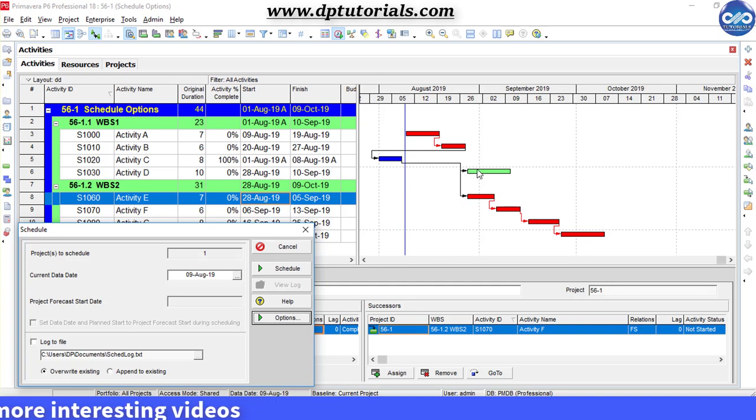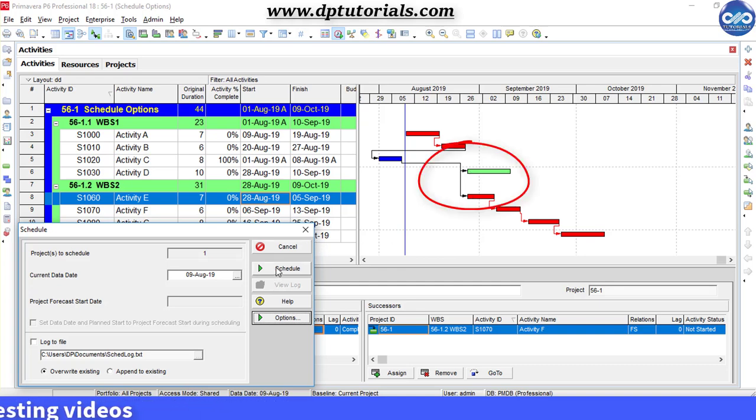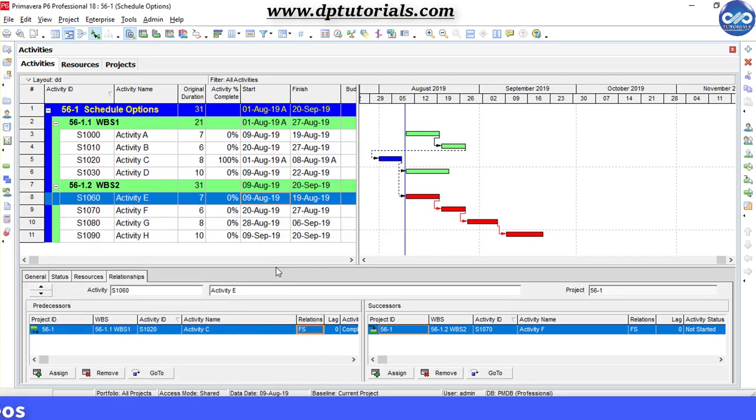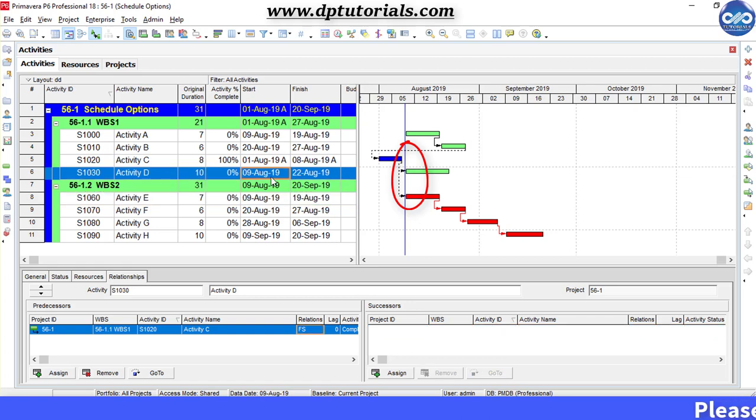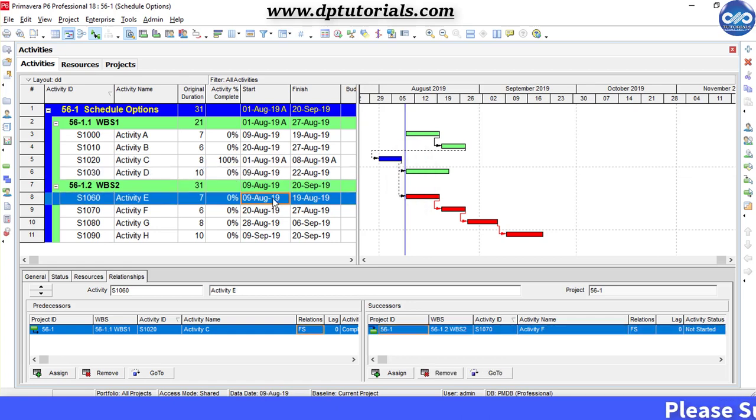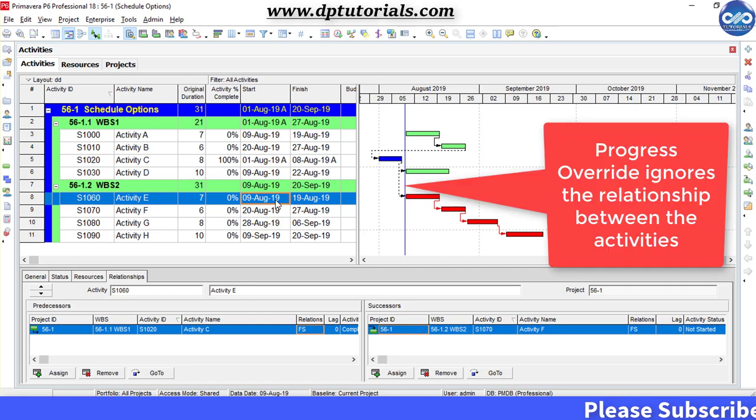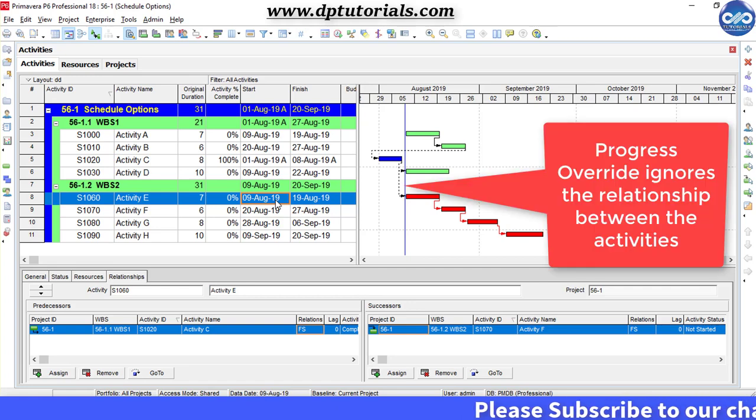Now have an eye on Activity D and E. Click this Schedule button. You will notice that Activity D and E's start date has moved to Datadate. This is because when scheduling uses progress override, Primavera P6 ignores the relationship between the activities.